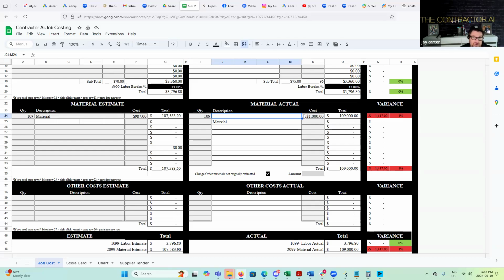So I'm going to share with you my third principle here. I have an 80-20 rule in my business. Meaning that I want to work 80% of the time with the supplier that I like and that I've chosen for that year, that services me the best, that I feel confident in. Even knowing that it might be a 1 to 2% difference, what I do is I have 20% of my business shared with 7 or 8 other suppliers that can offer the same services.